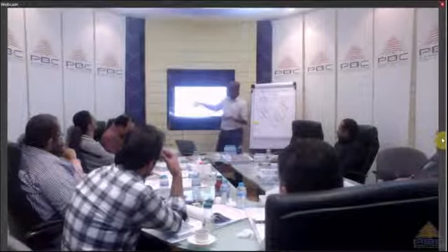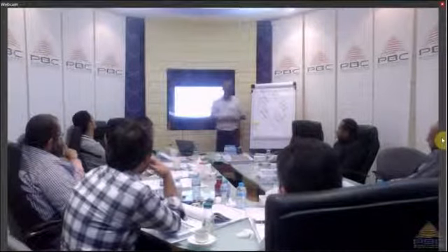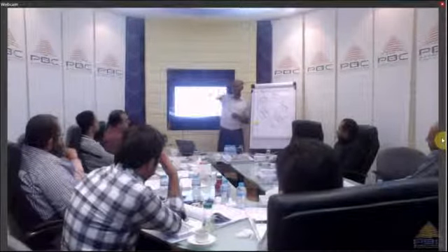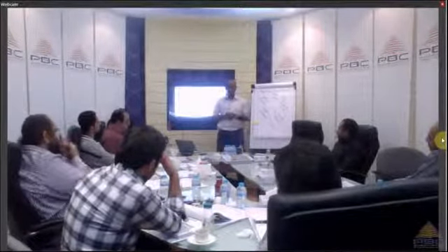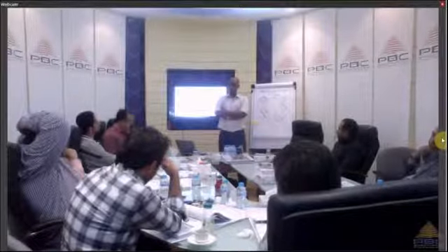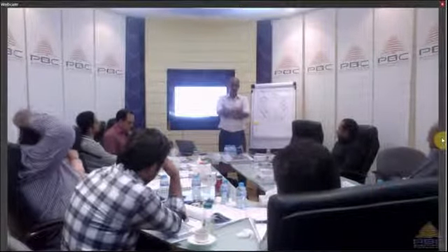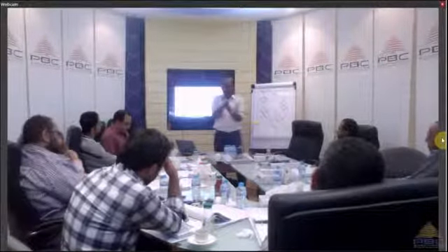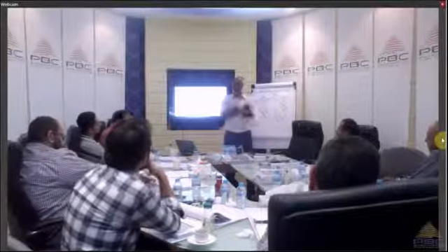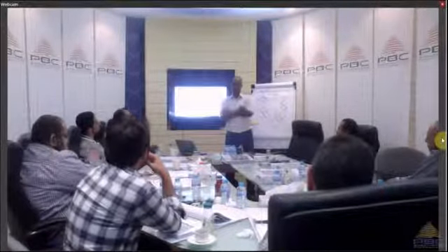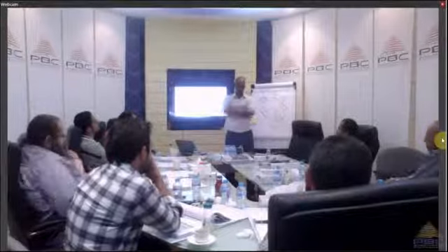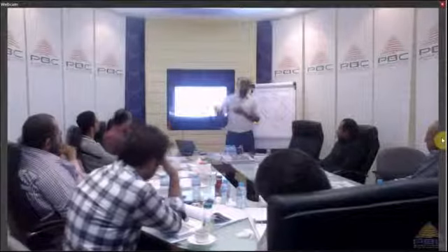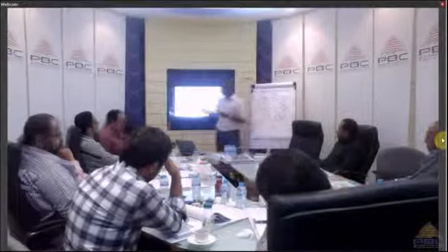Sometimes you have what is called an external dependency. An external dependency means you depend on input from outside the project activities, i.e., I'm waiting for the construction permit, for example. I cannot start work until I get the approval, right? Now, during your project as well, sometimes you're waiting for the client to make a decision on something. So again, this is called an external dependency. You just have to wait until that external approval comes.